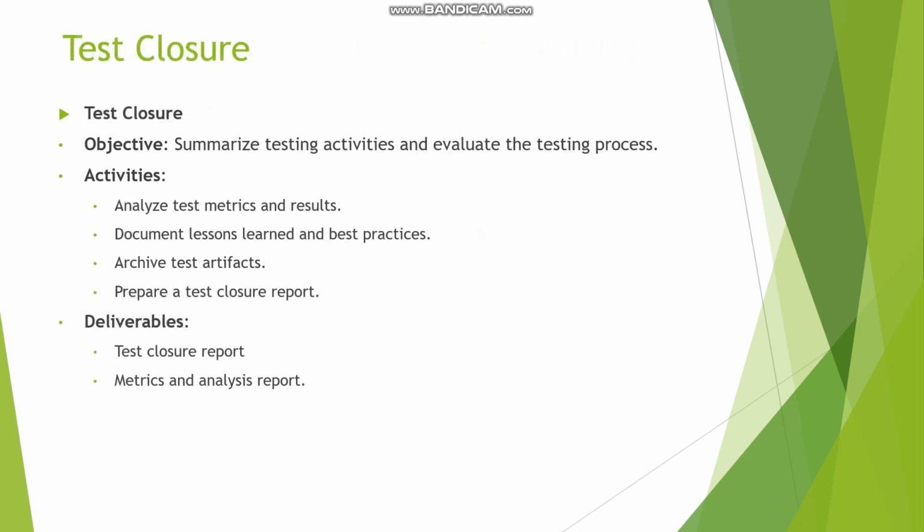Test closure. Test closure objective is to summarize testing activities and evaluate the testing process. Activities are analyze test metrics and results, document lessons learned and best practices, archive test artifacts, prepare a test closure report. Deliverables are test closure report and metrics and analysis report.